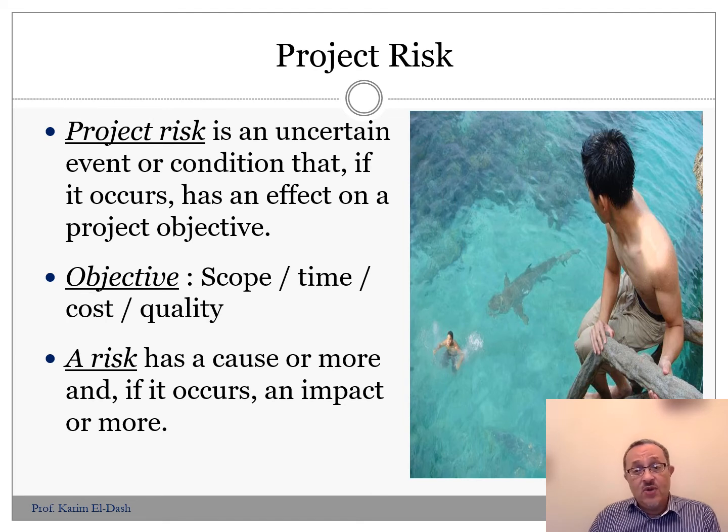But for the quality, we have to stick to the quality. It is difficult to have a kind of deviation from the quality specs that we have for all items or any single item in the project. Once we have defined the specs of all the items, item by item, in this case, we have to stick to those specs. We have to achieve those specs unless the sponsor or his representative has agreed to change those specs. And again, we have to stick to those changed specs as well.